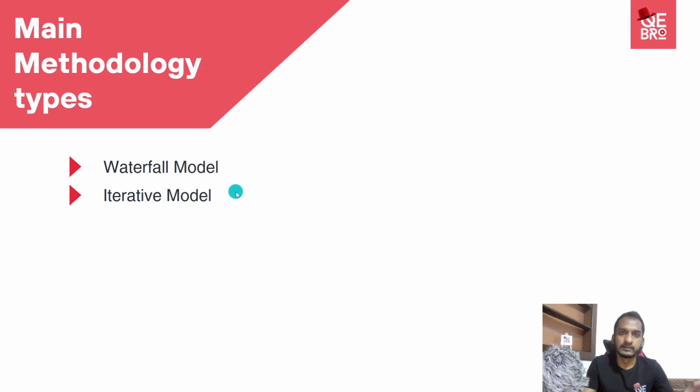In the waterfall model, as you know, we need to do one after another. First, we need to start with the requirement analysis stage. We need to complete it fully, 100% complete. There should be artifacts, and those will be the inputs for the next step, the designing part. Then that also needs to be fully completed, and it will give the artifacts as the input for the next step, the development. Likewise, it will go one after another. So that's why the name waterfall came in.